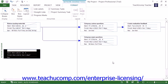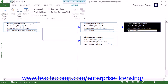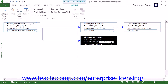You will then need to enter the details of the task. You can also create new linked tasks by clicking and dragging from an existing task shape to create a new linked task whose details you can then enter.